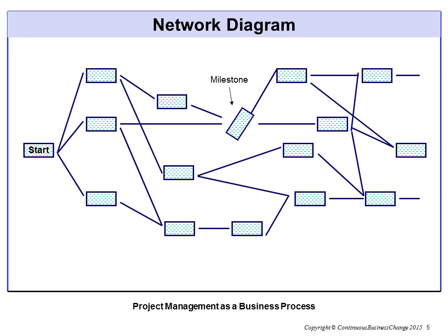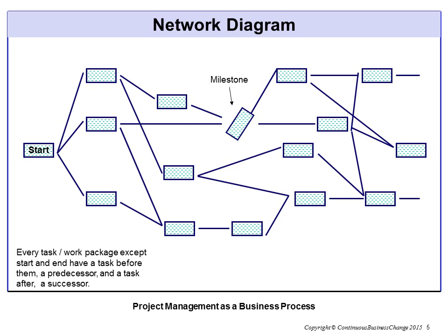This is a graphical network diagram created with Post-it notes. Just as we recommended creating the work breakdown structure with Post-it notes, we also recommend creating a graphical network diagram with Post-it notes when the project is large and complex, it's critical to the organization, there are specific schedule constraints, specific cost constraints, specific quality requirements, limited resources, or there's a difference of opinion regarding task sequence and dependency.